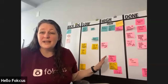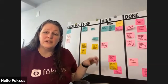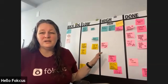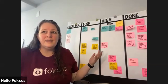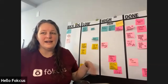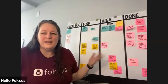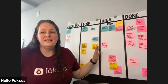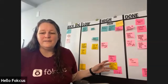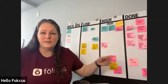I think we could do a separate session on Scrum and sprints and some things like that. There's some tools you can use in parallel with this, so you can use this for planning. This works really well for things that don't have deadlines. Maybe you have a goal, like we want to finish something by the end of the year, but it's very abstract. You don't know how long it's going to take, and you don't even know what the tasks are yet. You're trying to figure out, are people interested, and are we trying the right things? This is a really good way to manage tasks and activities to make progress without having to be so granular that you could assign people, like, here's your list of things to do this week.